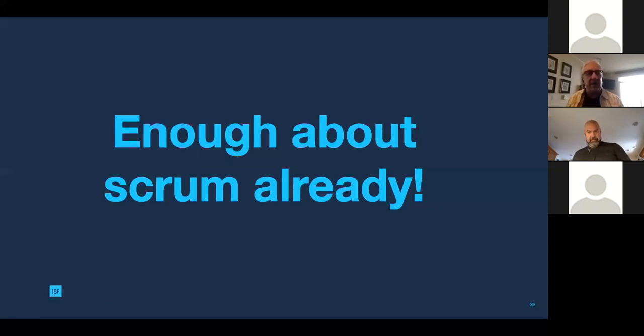So again, this team that I'm working with has done two things along those lines. One is that at one of their meetings, I forget which one it is, they have a separate backlog of epics. And so they will actually review that backlog, and that review will lead to them splitting out, again, story splitting, because epics are huge stories. And so you split out smaller stories to try to get that epic done.